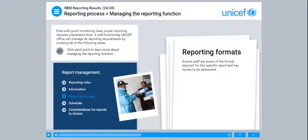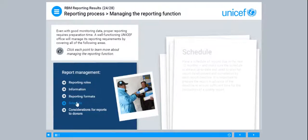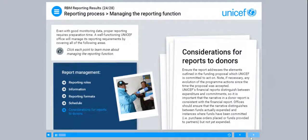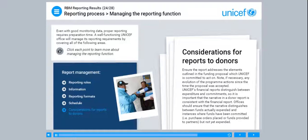Ensure staff are aware of the format required for each specific report and key issues to be addressed. Have a schedule of reports due in the next 12 months, and make sure the schedule is always up-to-date and used to plan for report development and completion by each deadline. It is important to prepare the report in advance of the deadline to ensure sufficient time for a quality report. Ensure the report addresses the elements outlined in the funding proposal which UNICEF is committed to act on, noting any evolution of the programme actions since the proposal was accepted. UNICEF's financial reports distinguish between expenditure and commitments, so it is important that the narrative in a donor report is consistent with the financial report, distinguishing between funds actually expended and instances where funds have been committed.